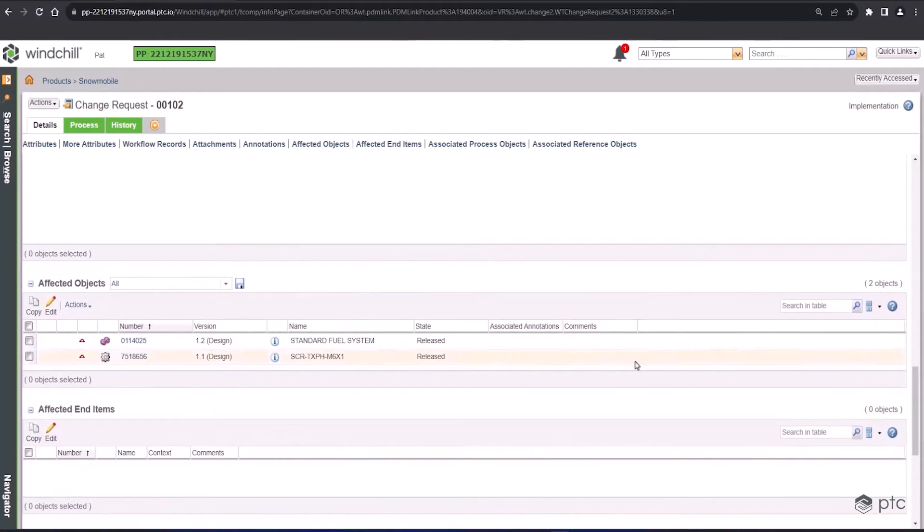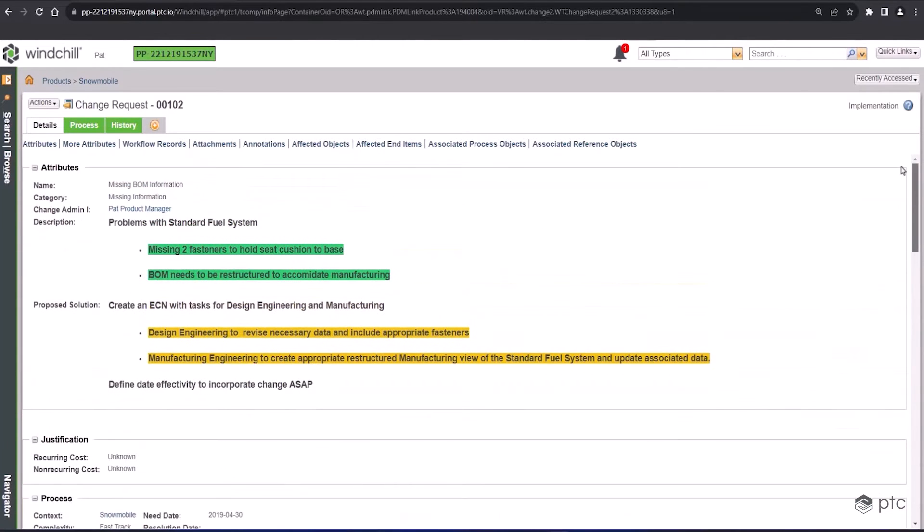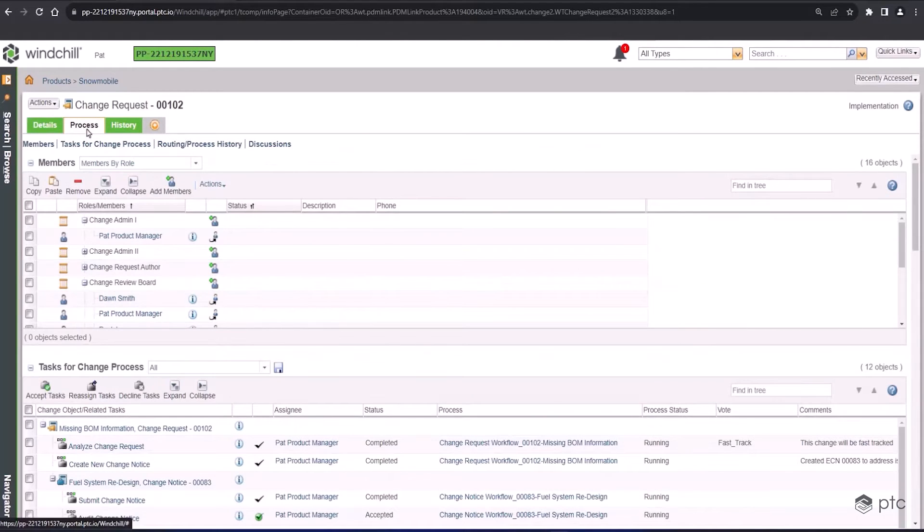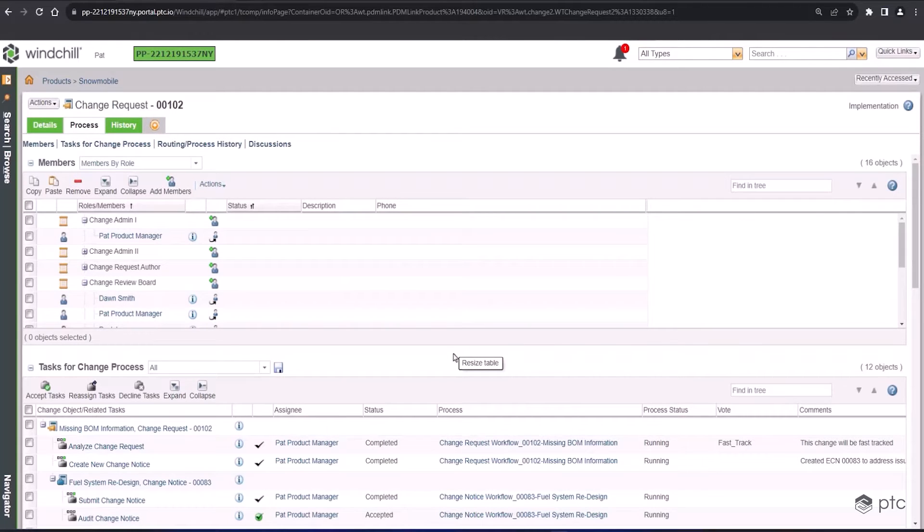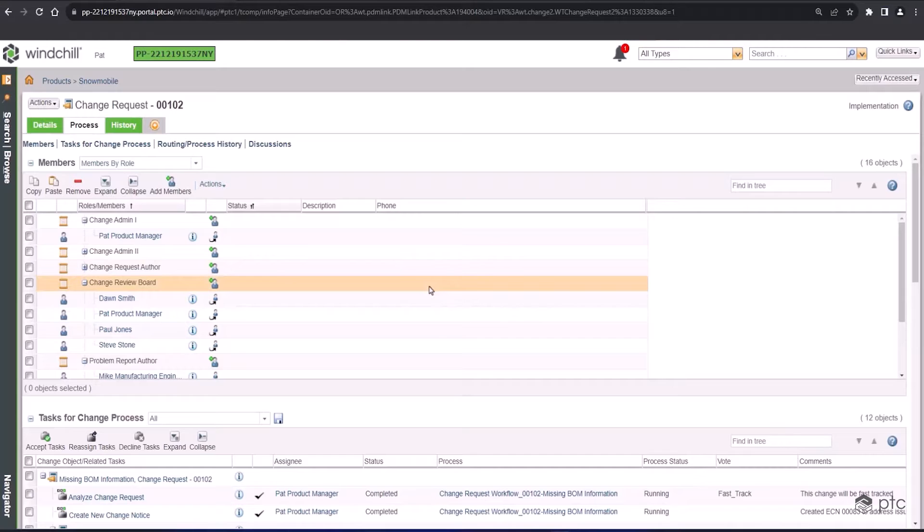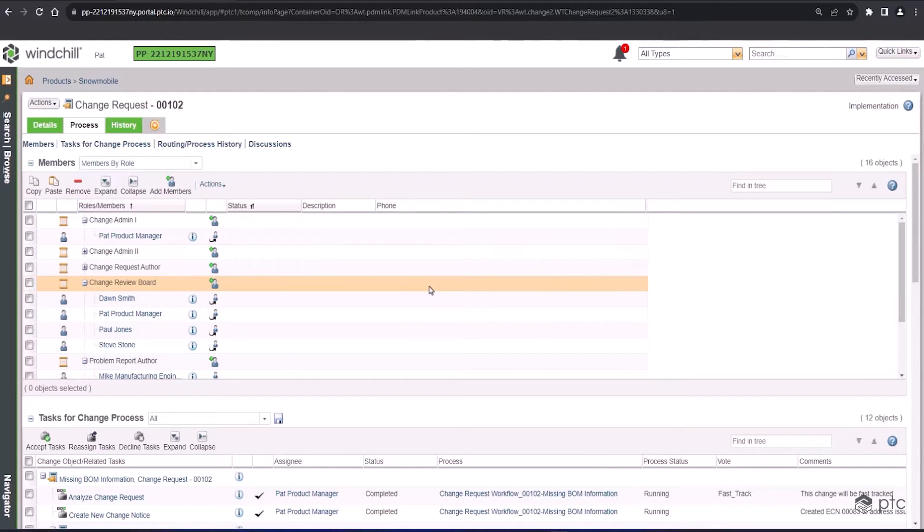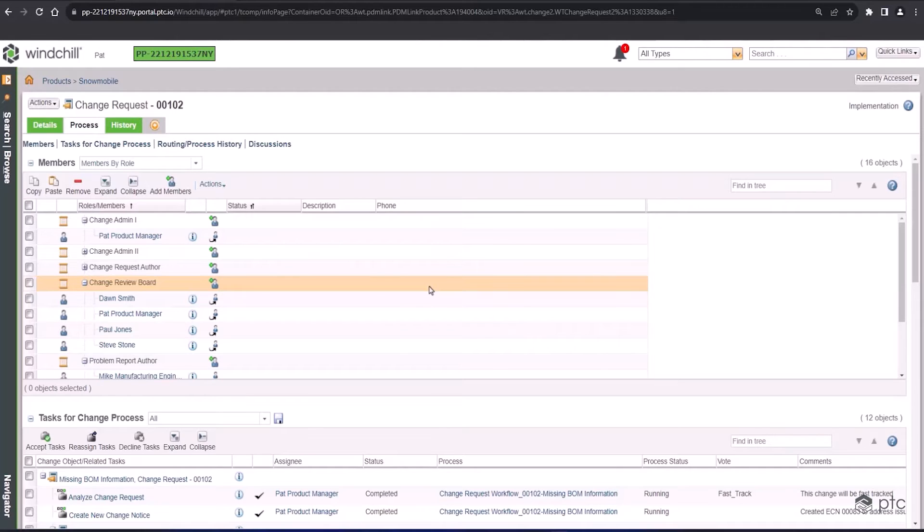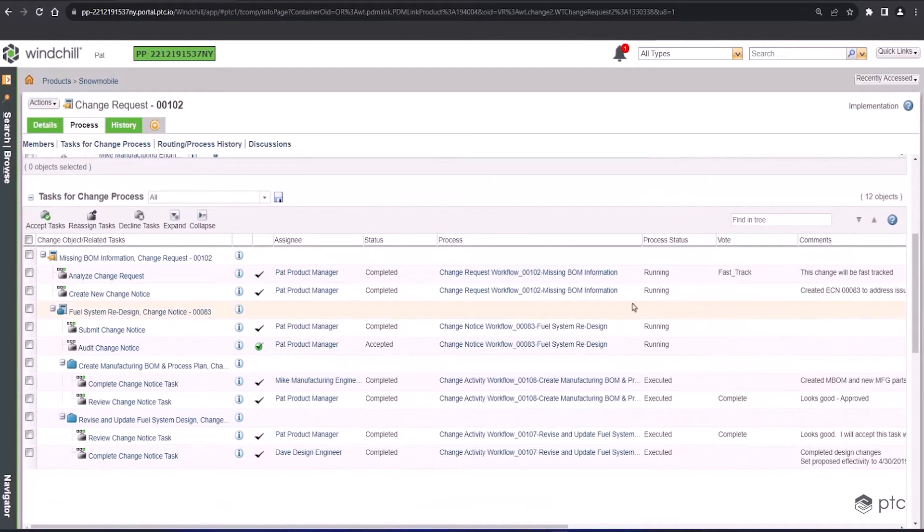Everybody that's involved in this change can review the affected objects and any associated annotations and documentation. And in the process tab, we can see the unique workflows, unique users, and unique tasks in these different change objects. The members in this change request are slightly different than the ones in the problem report. The reason is that in this change request, we have a change review board, which is a group of users who are responsible for reviewing everything that goes into this potential change and determining if a change needs to happen. So it wouldn't fall on the shoulders of one person, it would go to a whole board of people, and they would collaborate and work together to either approve or shut this change down.